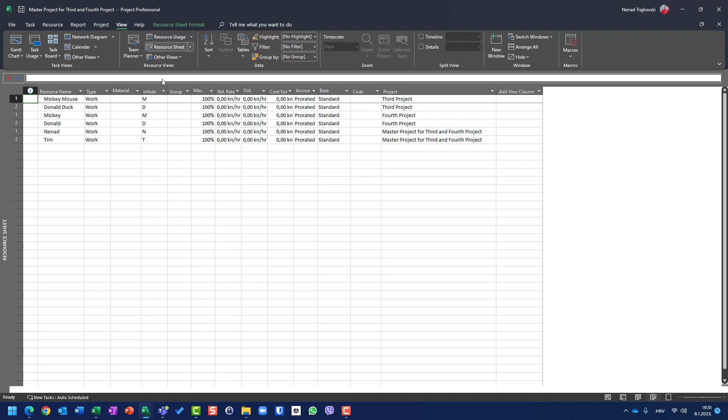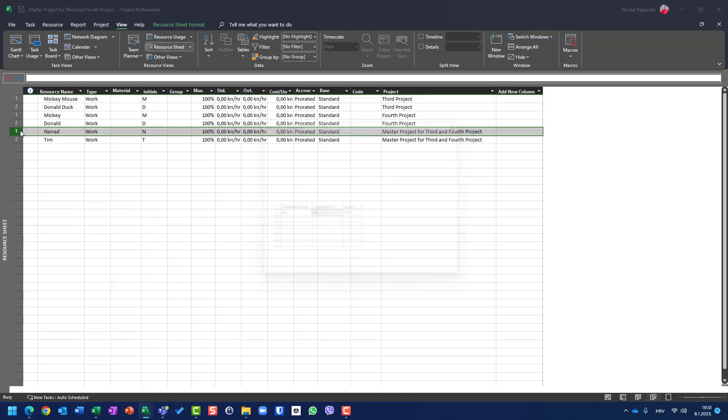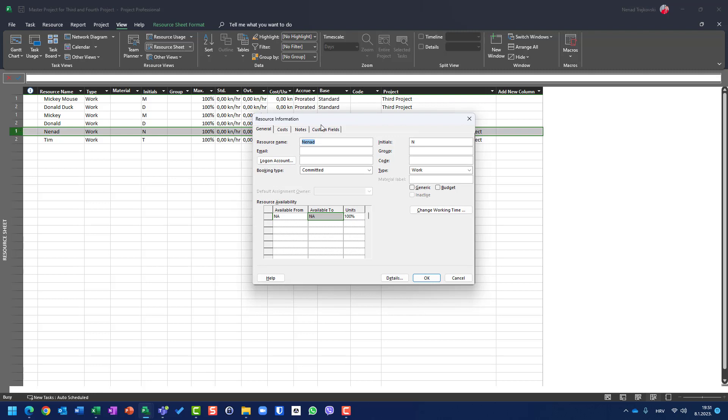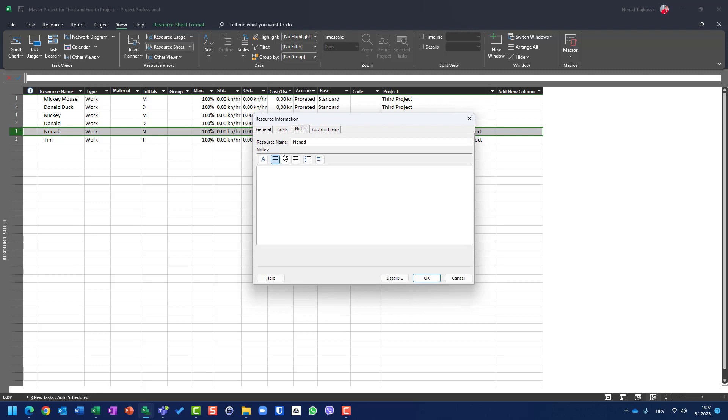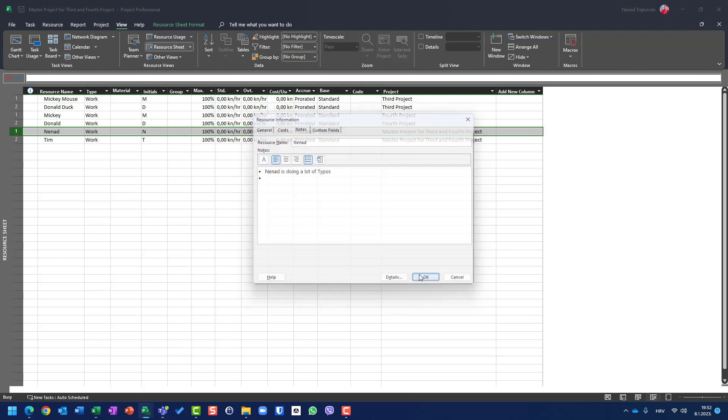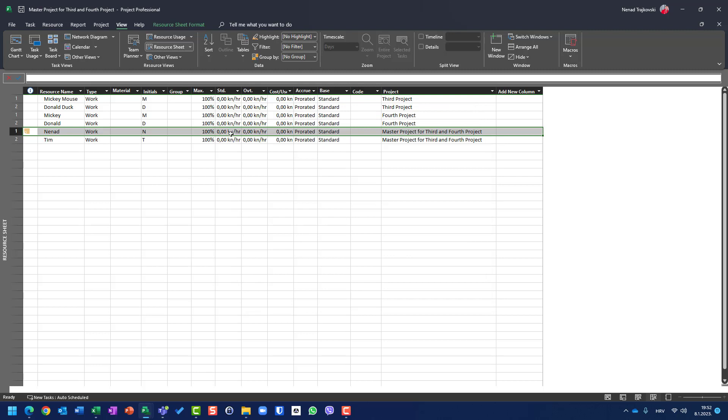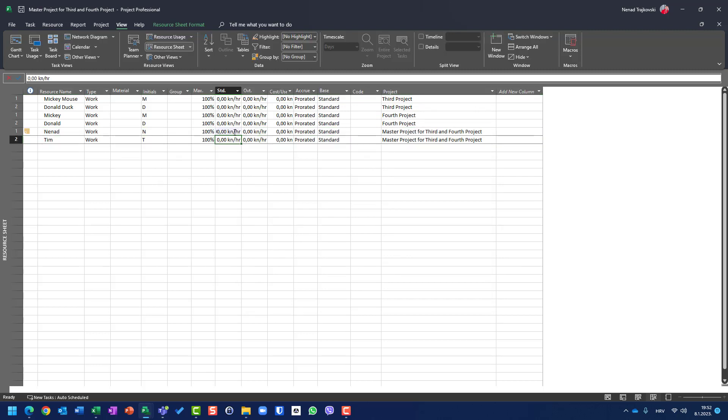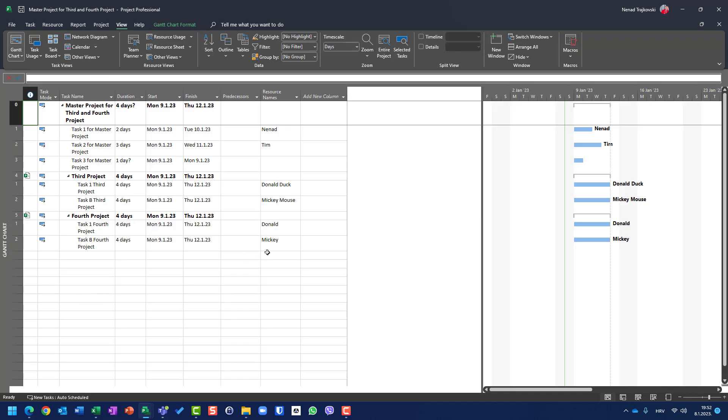So you should put resource names under resource name on the Gantt chart, not via resource sheet. And then when you put them in the Gantt chart, not via resource sheet, you can use them and change whatever you want to resource sheet. For example, let's put notes here and say Nenad is doing a lot of typos, or I can put here 200. Whatever. And now I will have it.